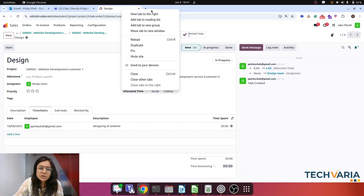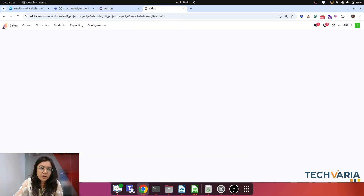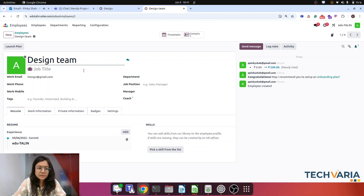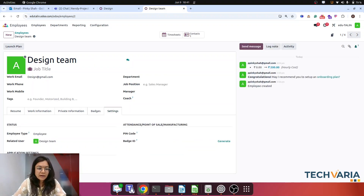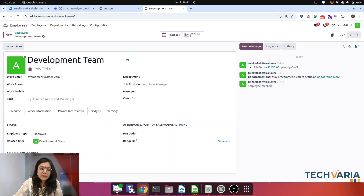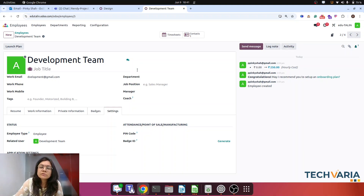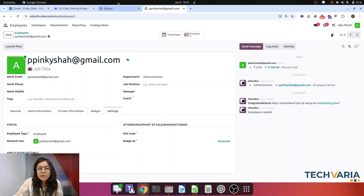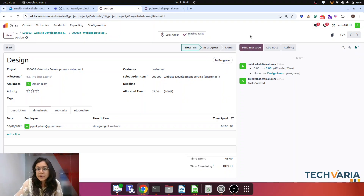In the employee settings, there is an hourly cost field. For the design team the hourly cost is 200, and for the development team it is 250. I have used team names here, but this hourly cost applies per individual user. Similarly there are hourly costs set for the testing team and the project manager. Odoo will count the cost by multiplying hours worked by this hourly cost setting.